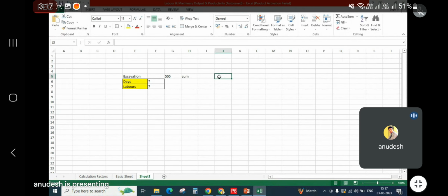We definitely go ahead and take the experience from our previous projects. So there could be certain steps to do this. First of all, you need to have a productivity sheet. If you have a productivity sheet in your organization, you can estimate any of these values based on that. Second, based on your previous experience.